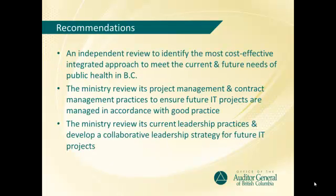Looking now at our recommendations to the Ministry of Health. First, given the ongoing challenges with the system, we recommend an independent review to identify the most cost-effective integrated approach to meet the current and future needs of public health in BC. Second, we identified numerous deficiencies in the Ministry's management of the Panorama project and contract, from public health staff and users not being adequately engaged, to IBM being unable to deliver on the original contract, and the Ministry renegotiating the contract in a way that transferred financial risk from IBM onto BC taxpayers. As a result, we recommend the Ministry reviews both its project management and contract management practices to ensure future IT projects are managed in accordance with good practice.